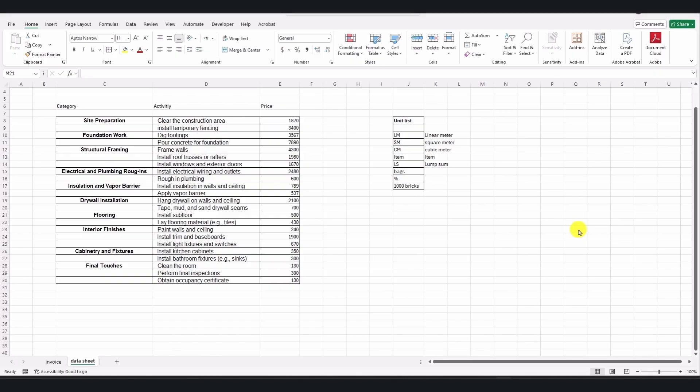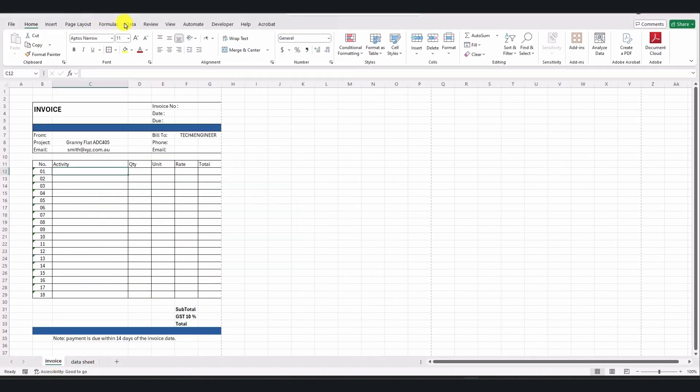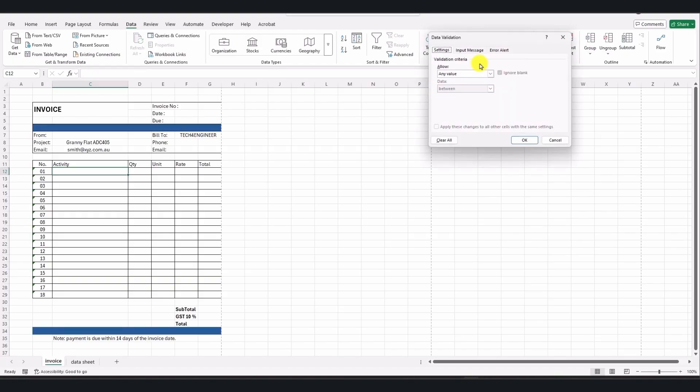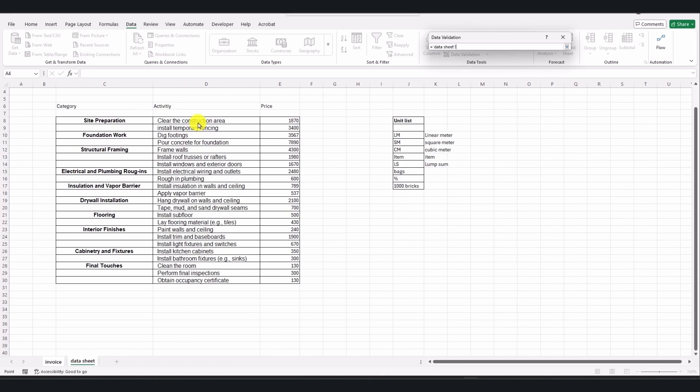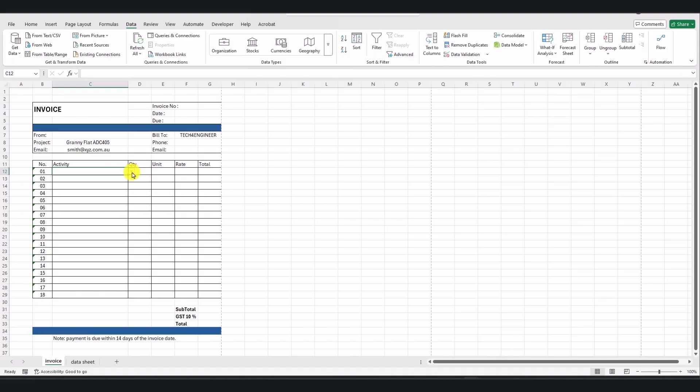As you can see, I have copied and pasted all these activities from another Excel sheet, where I use them for a building project in an Excel Gantt chart, which is very useful for time management. That Excel Gantt chart is available on this YouTube channel, and it's similar to Primavera or MS Project. If you haven't watched it, go and check that out. Once you have all this information, you'll see I have categorized activity, price, and then the units. Often in construction projects, we use linear meters, square meters, cubic meters, lump sum, bags, percentage, and 1000 bricks. The price depends on the unit. Now that I have all these activities in the datasheet, I would like to link them to the invoice sheet. First, I go to the Data menu. Then I go to Data Validation and click on Data Validation.